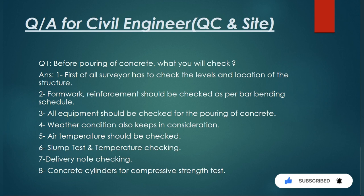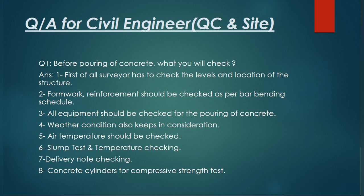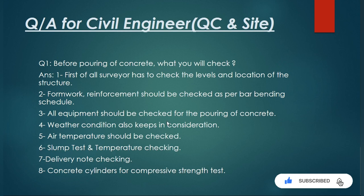Formwork and reinforcement should be checked as per the bar bending schedule or approved drawing. All equipment should be checked before pouring concrete. Weather condition must also be kept in consideration — if you are planning to cast concrete for any element, you have to check the weather beforehand, and manage accordingly. Air temperature should be checked, and a slump test and temperature check should be performed outside before casting.